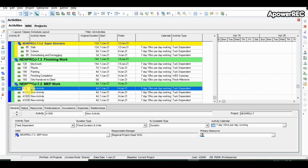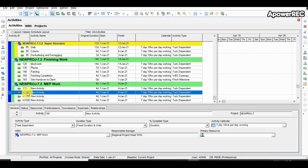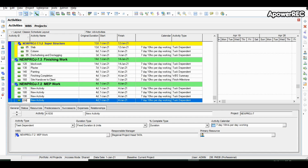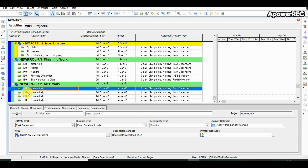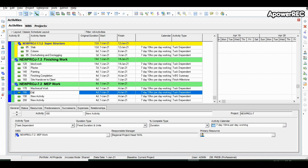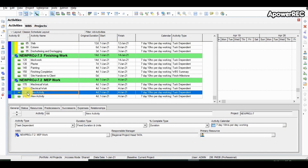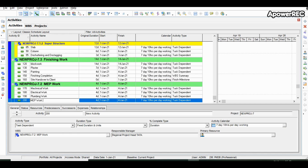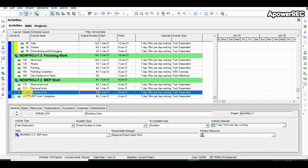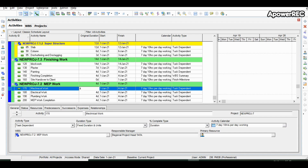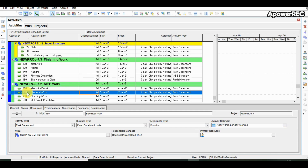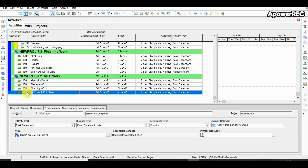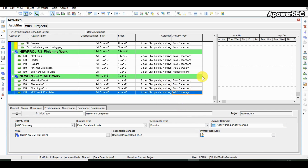Similarly we will put details in the MEP work WBS. We are putting the activity code so we can filter later. In a real project we can use 'M' in the activity code so all activities starting with M relate to MEP. First we define mechanical work, then electrical work, then plumbing work, and one more activity showing the summary — MEP work completion. Mechanical work is 4 days, electrical work is 7 days, plumbing work is 3 days. MEP work completion does not need a duration — we change it to WBS summary and Primavera calculates the duration.